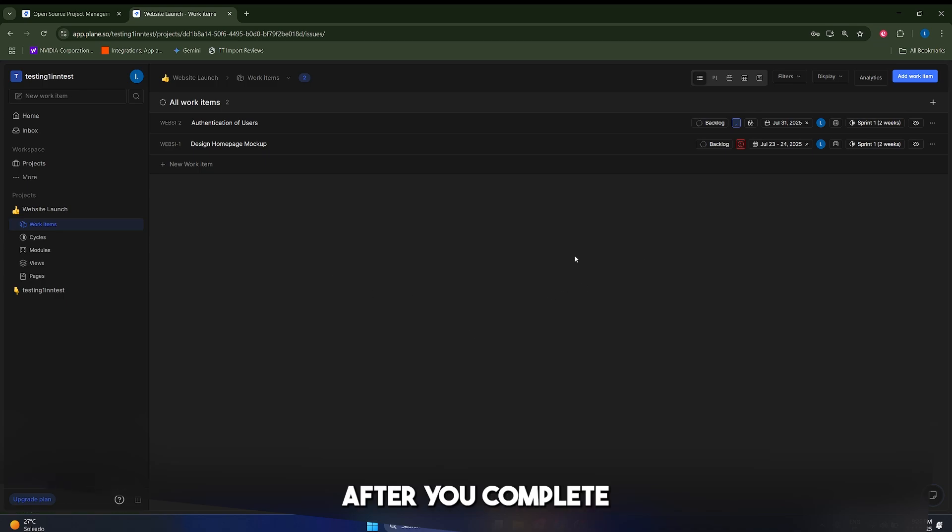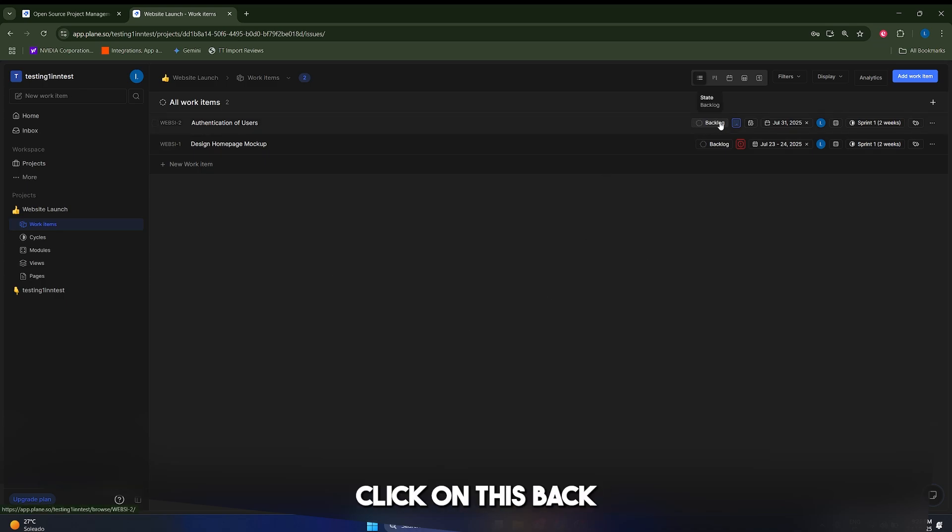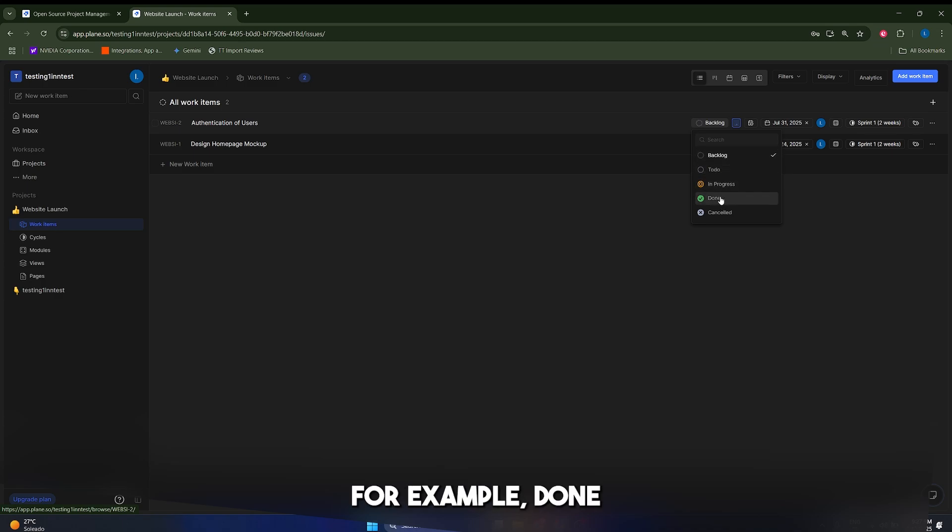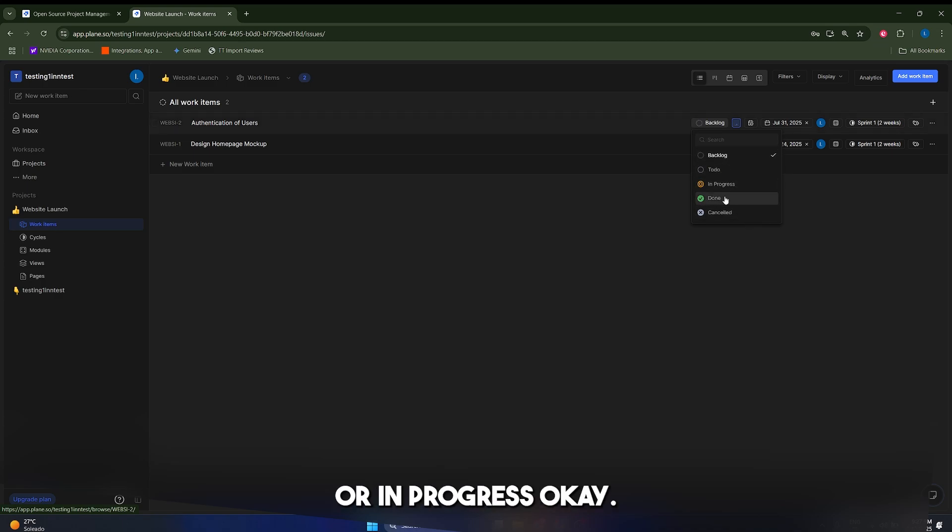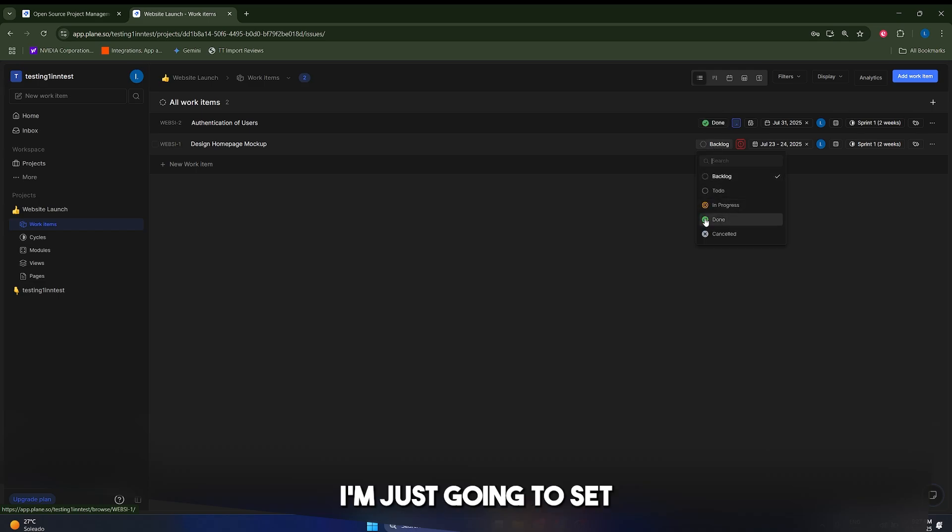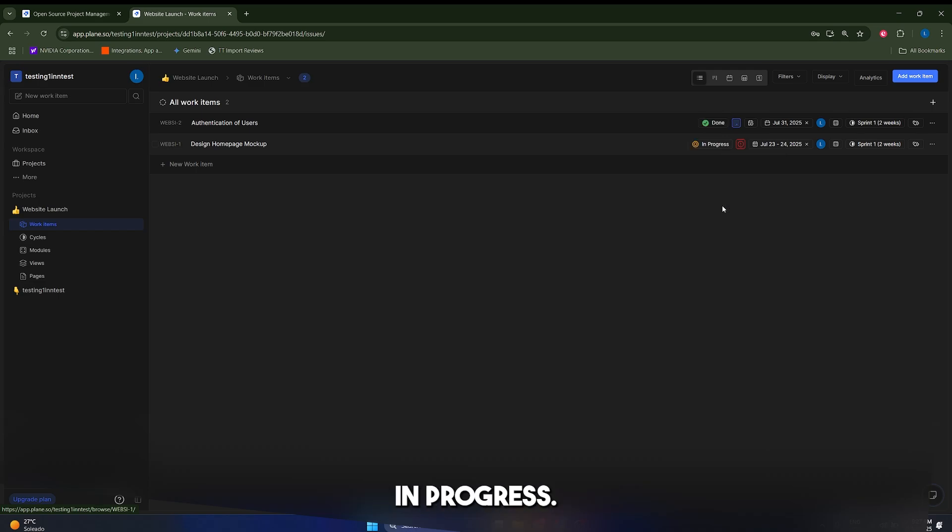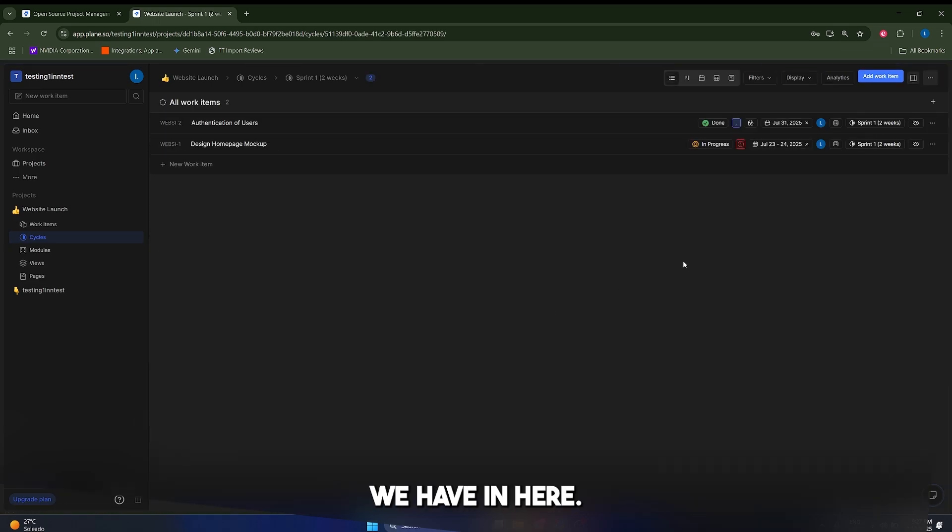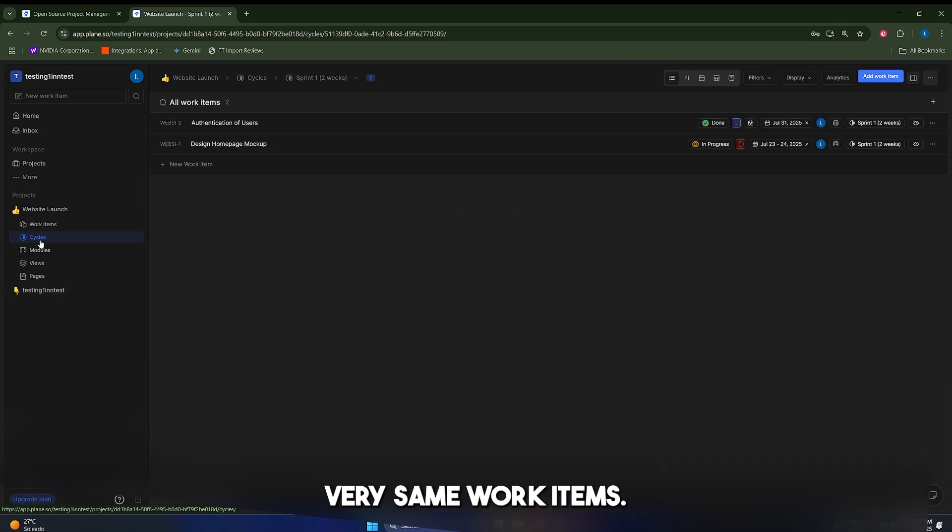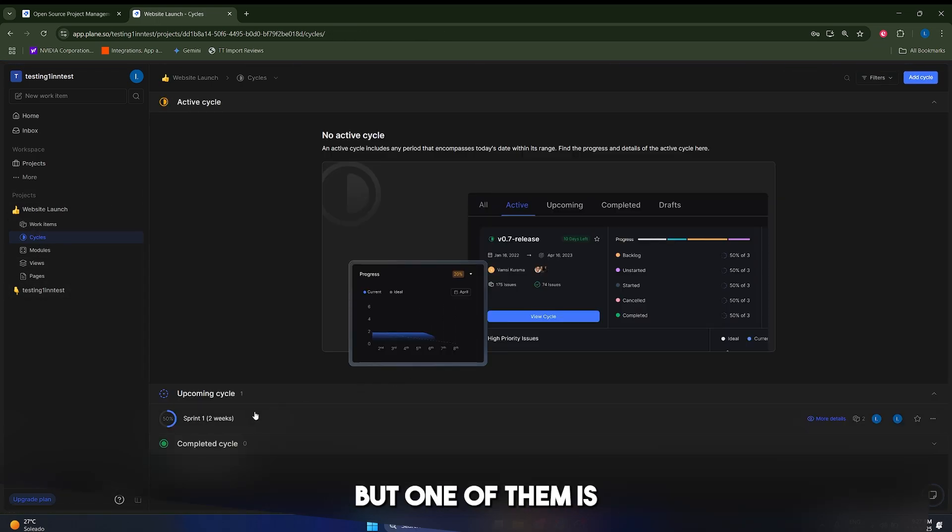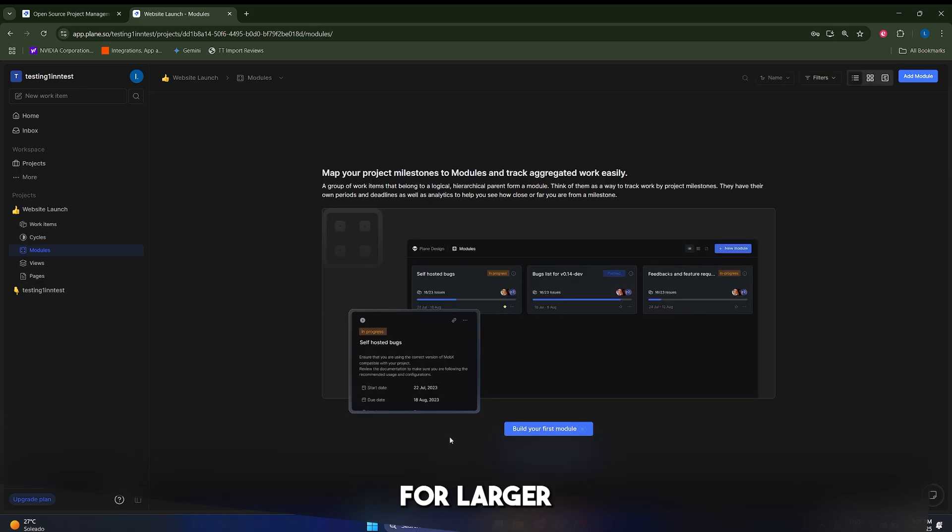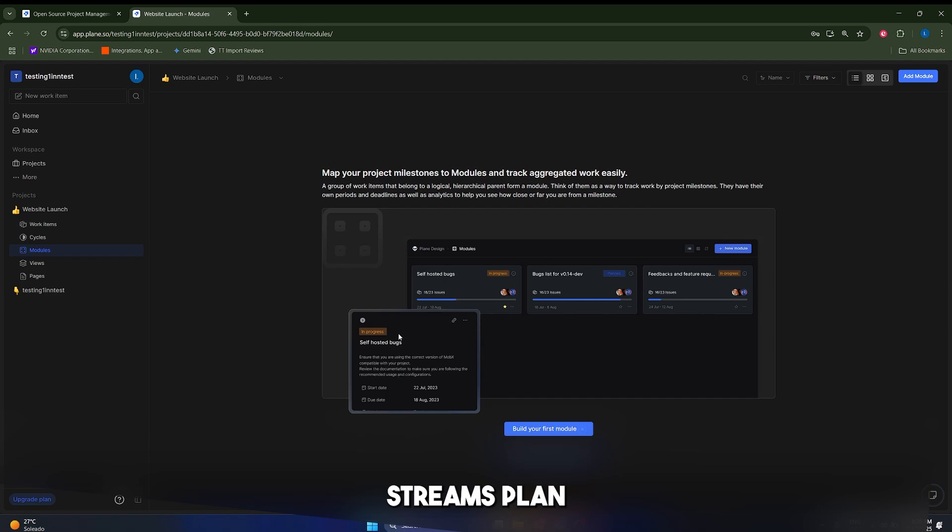Alright, after you complete one of these tasks, you can just click on this backlog button in here, and you can set the progress to, for example, done, or to cancel or in progress. In my case, I'm just going to set this to done, and this to in progress, and if we go back to our cycles, look what we have in here. We have this very same work items, but one of them is going to be completed, so it says here 50%.